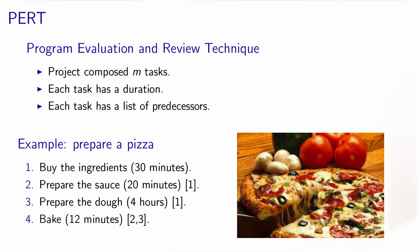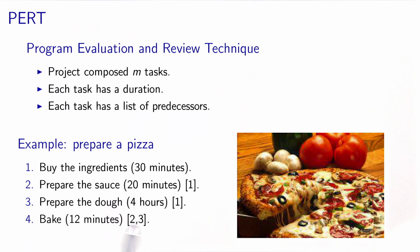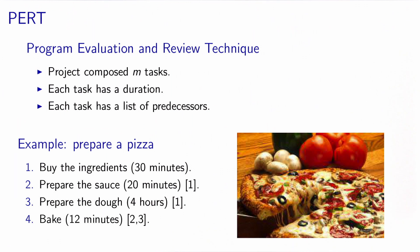Each task has a list of predecessors. In order to prepare the sauce, task 1 — buying the ingredients — must be completed. Similarly, preparing the dough also requires task 1 to be finished. And in order to bake the pizza, tasks 2 and 3 must both be finished. A predecessor is a task that needs to be terminated before the current task can start.